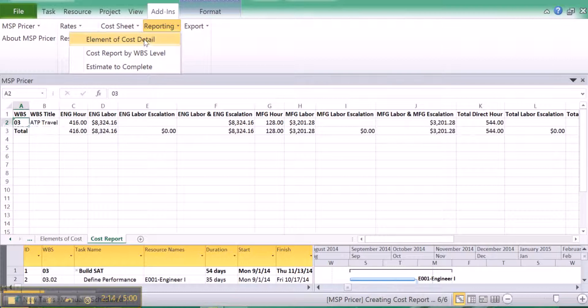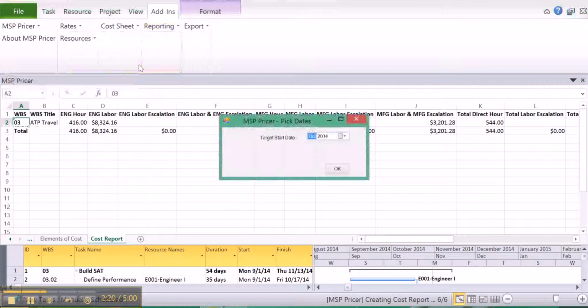This is total program, so funding profiles here with time-phased dollars by month, but then we need the all-important estimate to complete. An estimate to complete is simply combining actuals through a certain period of time with forward pricing, i.e., the work remaining, and we combine the two in order to create an EAC.